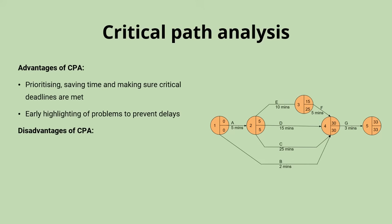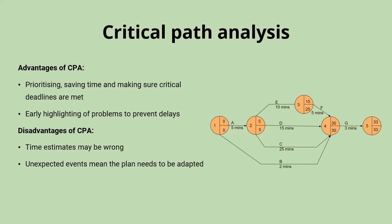On the disadvantages side, as with any predictive tool, critical path analysis relies on the accuracy of timing estimates — if they turn out to be incorrect, it becomes fairly useless. Even with watertight estimates, unexpected events can always throw a project off course. A good discussion point is that the effectiveness of critical path analysis depends on the skills and experience of those preparing the network.